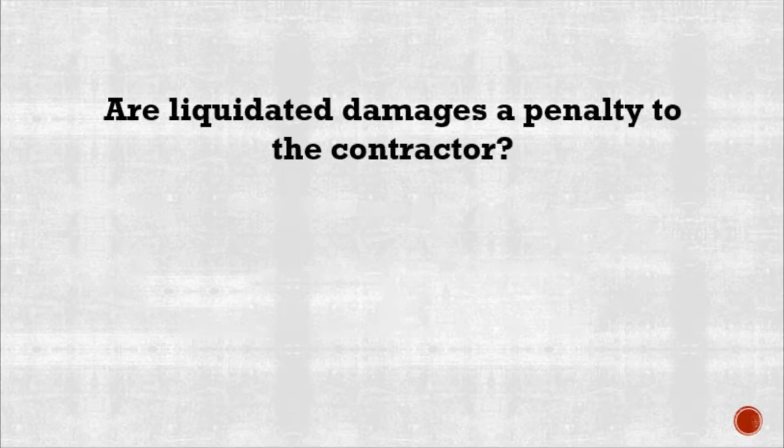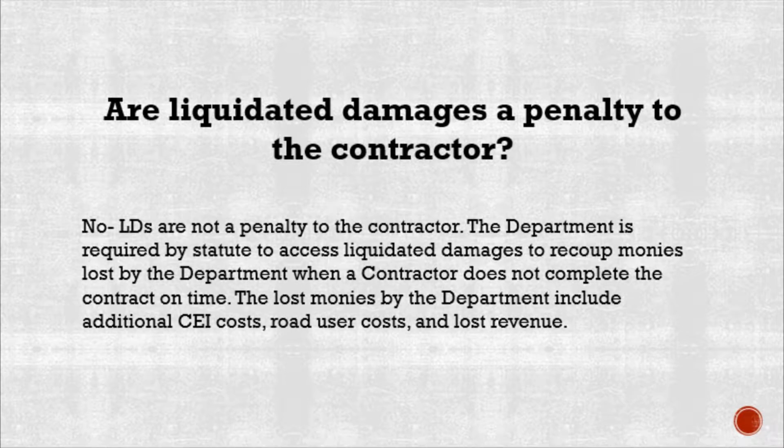Are liquidated damages a penalty to the contractor? No, liquidated damages are not a penalty to the contractor. The department is required by statute to assess liquidated damages to recoup monies lost by the department when a contractor does not complete the contract on time. Lost monies by the department include additional CEI cost, road user cost, and lost revenue.